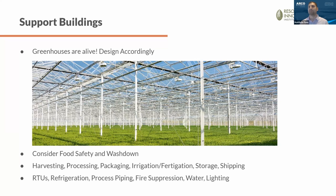To give you an example, the climate is held pretty steady in the greenhouse during production, once the mechanical systems come online, the networks are established, and the commissioning is completed. But during construction and prior to the building coming live, greenhouses are basically just a furnace. They take the sun. The greenhouse can be 150 degrees on a hot summer day. There are special considerations you have to take into account when building these facilities, and it's not always straightforward.